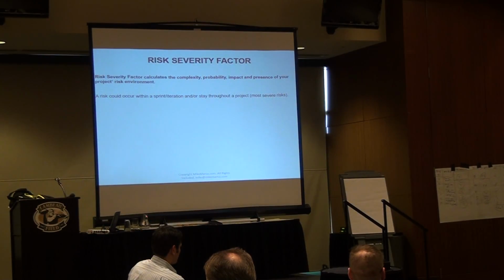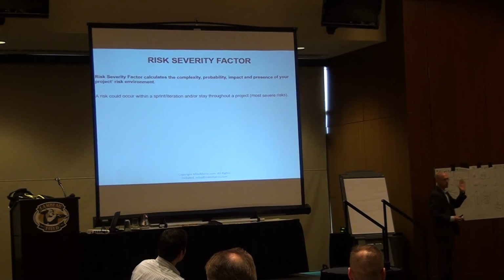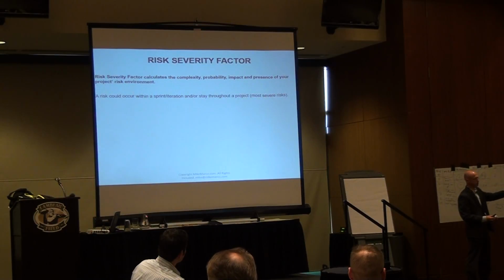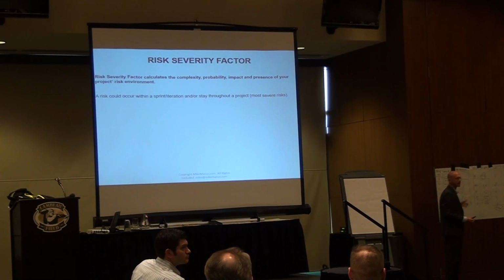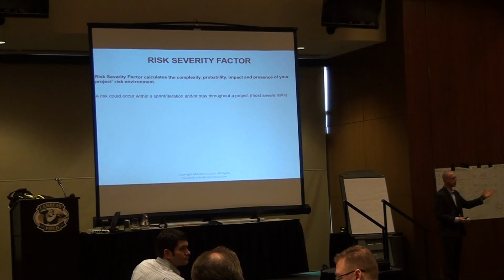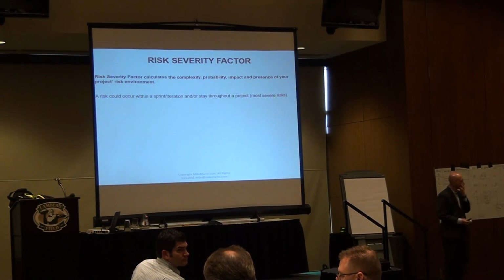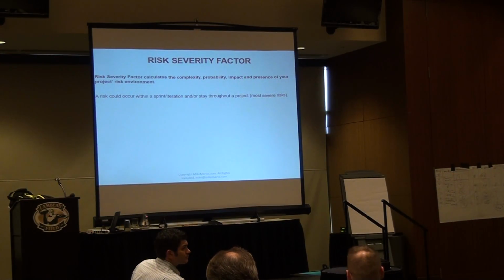So let's say we have a couple of risks here. If you compare these risks, like lack of expertise versus change of sponsorship, this change of sponsorship is a one-time event, but it's going to have a lasting impact throughout the project. Let's say lack of expertise, I can hire somebody and that risk is gone. Are you with me? So the severity of a risk is measured on a scale from 1 to 10.